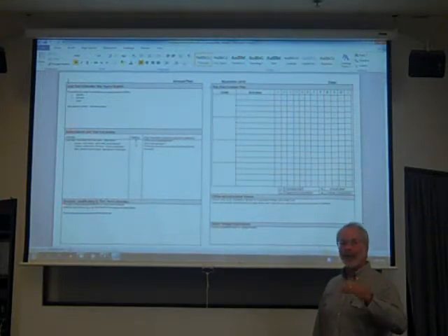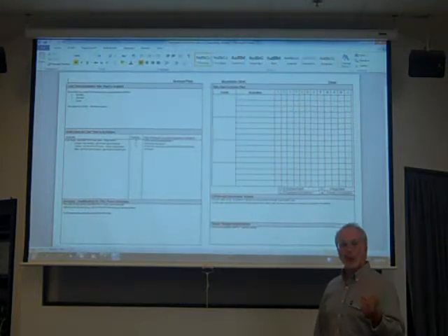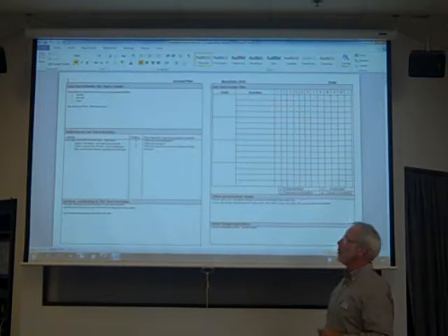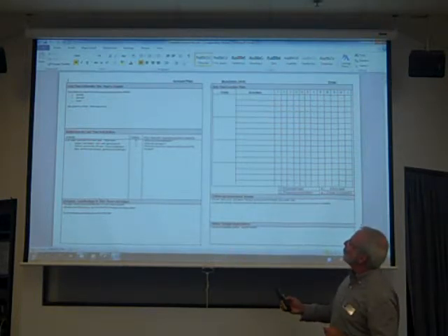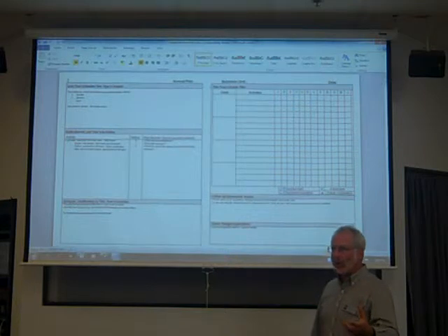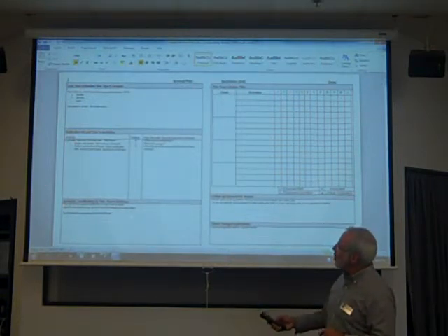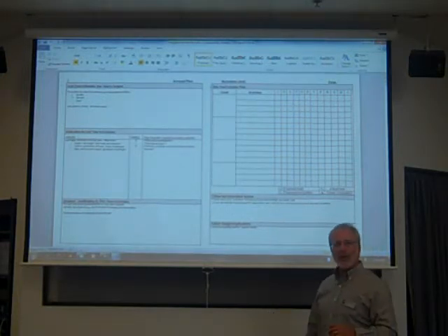Now, it's very important that we identify all of those, especially the reds, because the reds are what we're going to learn most from in going forward and planning for next year. Also, key results and lessons learned. So what did we learn from that activity? And obviously, as you know, we learn more from activities that we struggle with than from activities that we did really well at. Below, in this section now, is analysis and justification for this year's activities.